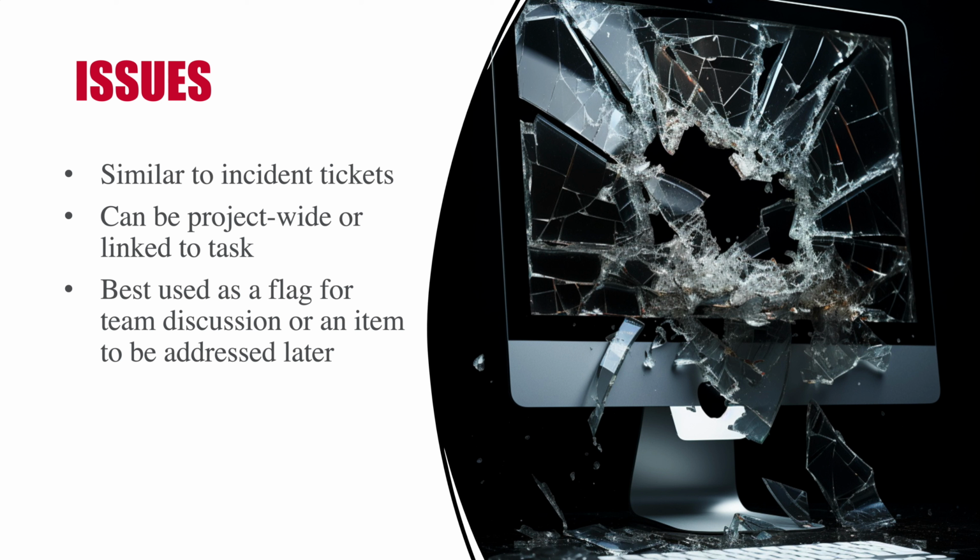A few examples of scenarios that might not be a good fit for issues are non-blocking challenges or complications that arose when working on a task, or questions to a specific project member. These would be more efficient in a task comment feed or good old-fashioned hallway conversations and team meetings.